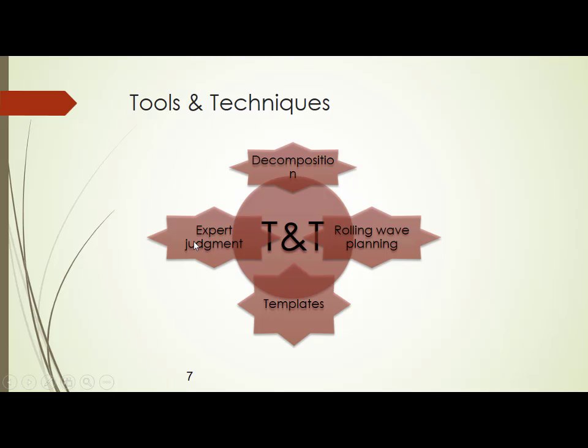See, I told you that if you want to do a work package called legal advisory, what will you do basically? You have to define the activities for taking the legal advice. So there you have to take expert judgment. Probably you have to talk to one more person who has already purchased a house before. You will ask him, tell me how will I take the legal advice for verifying this paper. So he will give you some expert judgment and say this is how you need to go. The same activities you will follow. That is why it is called expert judgment.